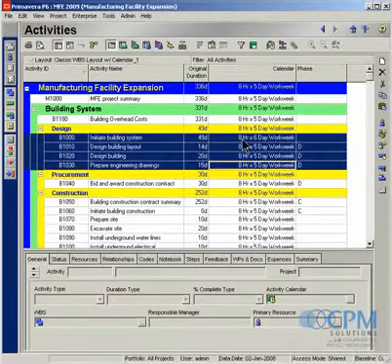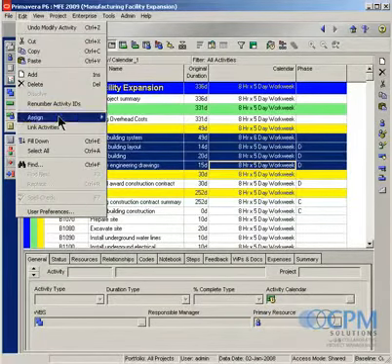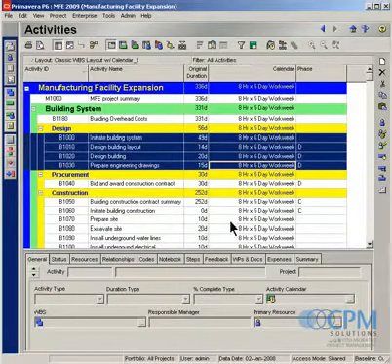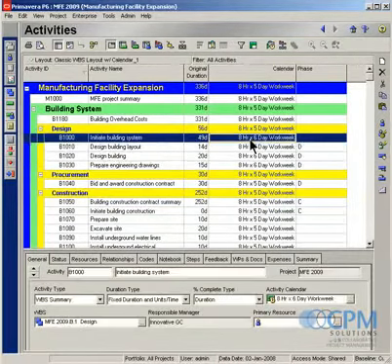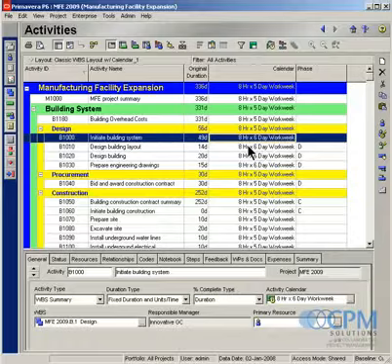So the procedure here is to change the first activity, hold down Shift, select the activities that you'd like that value to end up in, and then go to your Edit menu and choose Fill Down. So what we've done is we've copied that 8x6 day work week to the fields for the activities just underneath.